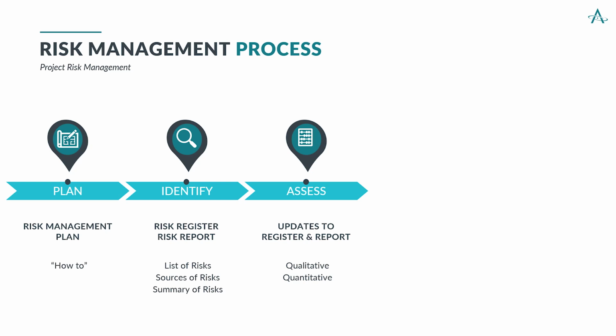So you can put those two measurements together, and then you can create a product. You can multiply those two and create some type of qualitative measurement of the risks against each other. That allows you to rank it based on that total risk score.